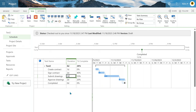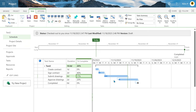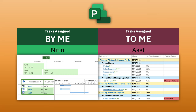The second important difference is dependencies. In a flat task hierarchy, each task has its own deadline and if it gets delayed nothing else gets delayed — that's in theory. In practice, something else will get delayed. The realistic picture of dependencies which Microsoft Project gives you is invaluable for any kind of project management. Third, assigned-by-me and assigned-to-me are both available as a consolidated view — as a resource I can see my tasks, and as a project manager I can see all my projects together. That doesn't happen in any other tool.